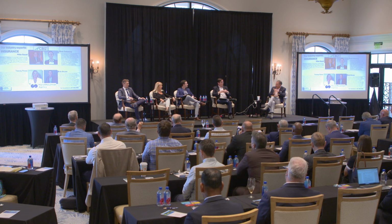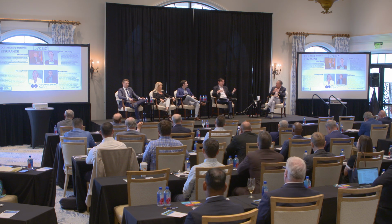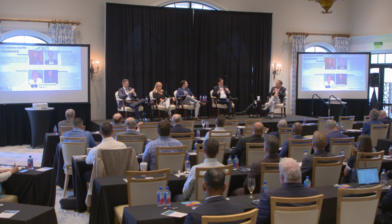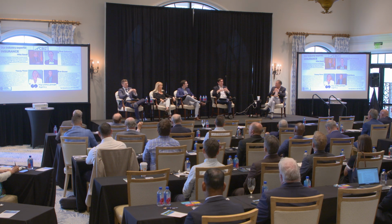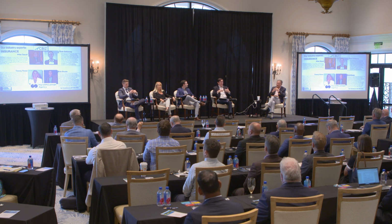And when you say contract, you're referring to which one of the multiple contracts? So I'm talking about the standard AIA contract, where typically the insurance requirements are listed. I mean, some clubs just send us the entire thing. Some just send us the insurance portion. I typically like to see all of it, but if it's just the insurance portion, that's fine. We just need to make sure the verbiage is there. Obviously, you have an attorney to review these contracts as well, but believe it or not, not all attorneys are insurance agents, and a lot of times they're not aware of what's available in the market. They're not aware of what the carriers are denying claims on. So we just need to have a lot of communication and an open dialogue.